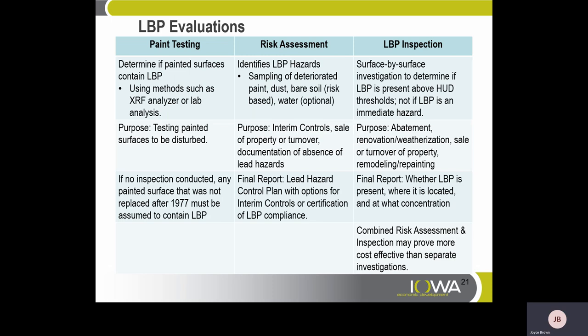LBP Evaluations — Paint Testing. Paint testing determines if painted surfaces actually contain lead-based paint, using methods such as an XRF analyzer or lab analysis. The purpose is testing painted surfaces to be disturbed. If no inspection is conducted, any painted surface not replaced after 1977 must be assumed to contain lead-based paint. For a risk assessment, you identify lead-based paint hazards through sampling of deteriorated paint, dust, bare soil, and water (optional). The final report is the lead hazard control plan with options for interim controls or certification of lead-based paint compliance.